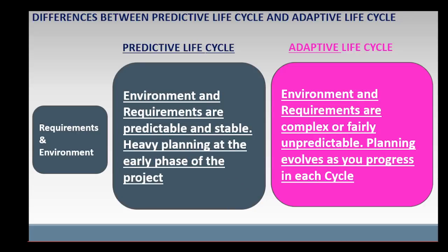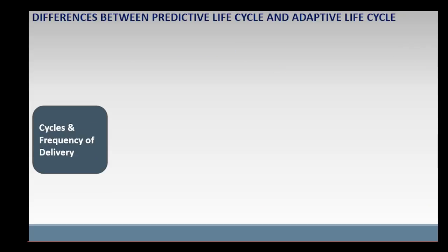Adaptive Lifecycle is used in situations where the environment and the requirements are compressed or fairly unpredictable. There is little upfront planning. Planning is done as you progress in each cycle in the project. For example, the requirements of an e-commerce website evolve throughout the project.